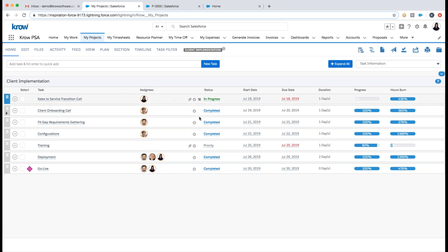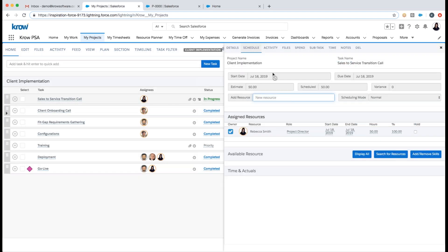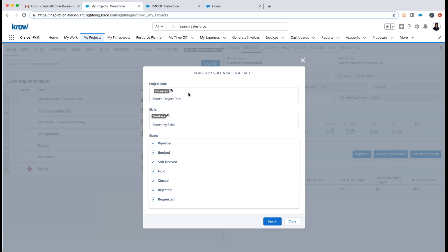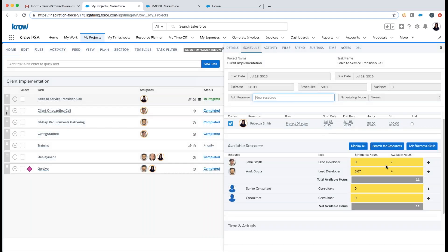Clicking into a specific task — the Sales to Service Transition Call — I can manage more granular task details, such as who's scheduled or assigned, who's entered time versus scheduled time. If I need to assign more resources, I can search by the project role and skills associated to the task. The system returns resources in descending order of availability for that specific date, showing who's scheduled on other projects and also placeholders scheduled on other projects that meet the search criteria.